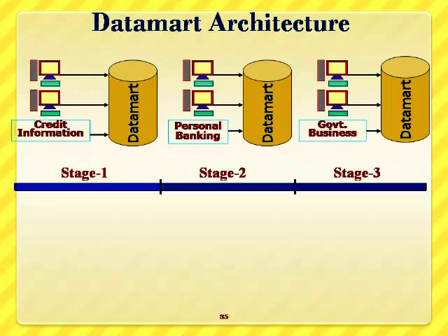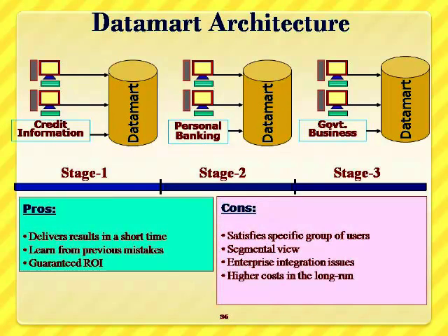Then next, I learn from the mistakes of this application and do not repeat those mistakes in the second stage. Take up another application, personal banking, build a data mart, stage 2. Like this, I will go on building different data marts, and then ultimately I build a data warehouse from all the different data marts. This is the data mart architecture approach of building a data warehouse.